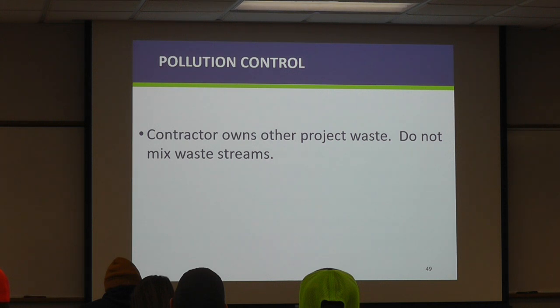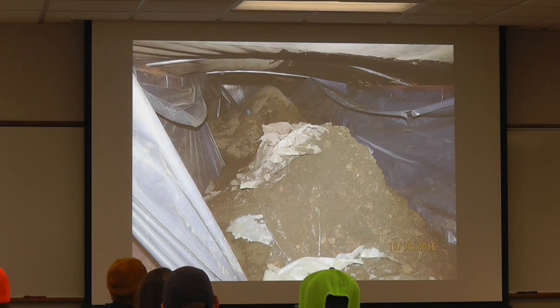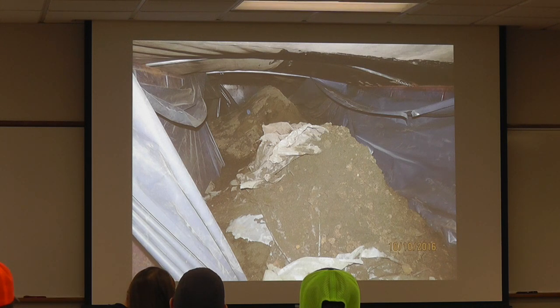Do not allow the contractor to mix the waste streams. If they can throw their stuff in it, and we pay to get rid of it, double bonus, right? That's a no. So if you start seeing all kinds of their waste, plastics and rope, buckets, steel pails, anything like that, that does not go into the landfill, because that does not go on the waste manifest. That's not painting waste, that is contractor waste. So they do have to keep that separate.